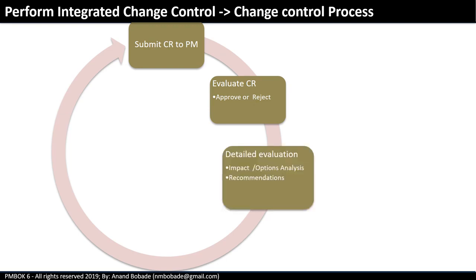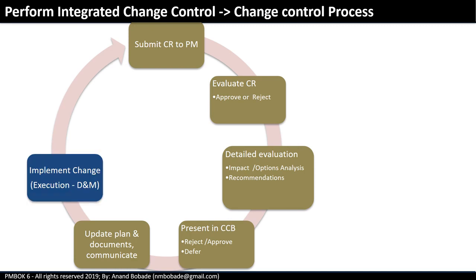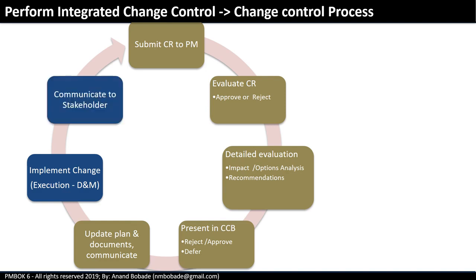The project manager with the help of the project team will perform detailed analysis, which may include integrated impact on other areas and recommendations. The change request will then be presented to the change control board. The CCB is responsible for reviewing, evaluating, approving, or rejecting changes. The CCB may request additional information or put the change request on hold. Once approved, the project manager updates the project management plan, subsidiary plans, or baselines and communicates decisions to stakeholders. Approved changes are implemented through the Direct and Manage Project Work process, and completion is communicated to relevant stakeholders.